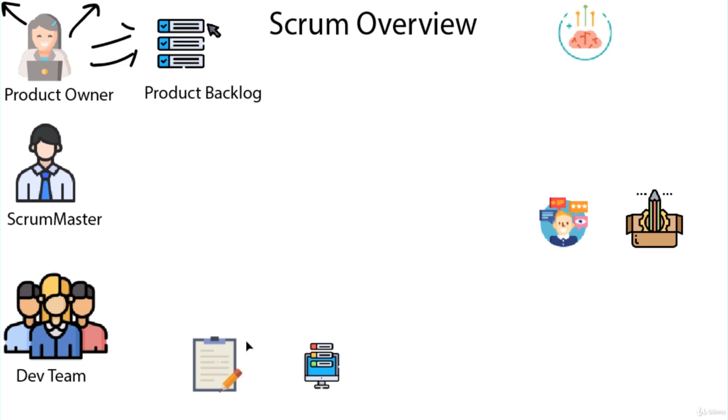And why does that make them more effective? Well, to have a fluid team like that, imagine the tasks you could get accomplished. Some weeks are going to be programming heavy. Some weeks might be design heavy. Some weeks might be architecture and fixing bugs heavy. If you have only 2 people on your team that can do each one of the tasks I just represented, the rest of the team will just sit around. There's not a lot for them to do. So they need to learn how to do everything so that the team can always mold and adjust and keep moving forward.